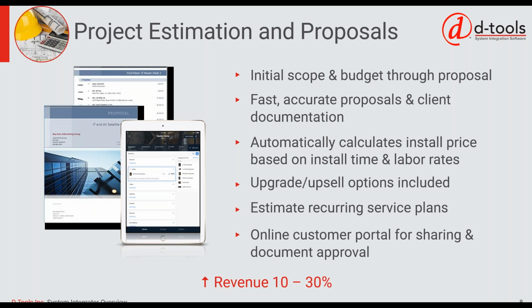Now, there's also some other benefits on the labor side. Once again, there are a lot of different ways that companies tend to estimate labor, and one of the most common is having a labor time linked to the part. The advantages of that, well, one obvious one is it does save time, so you don't have to build a quote or a parts list and then have somebody review it, or multiple people review it. You can have your standard times in there, and it just calculates automatically as you go.